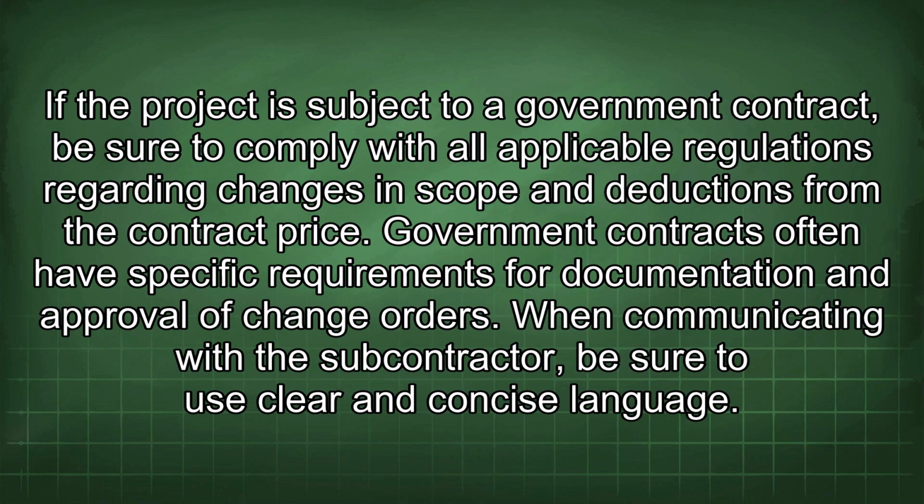If the project is subject to a government contract, be sure to comply with all applicable regulations regarding changes in scope and deductions from the contract price. Government contracts often have specific requirements for documentation and approval of change orders.